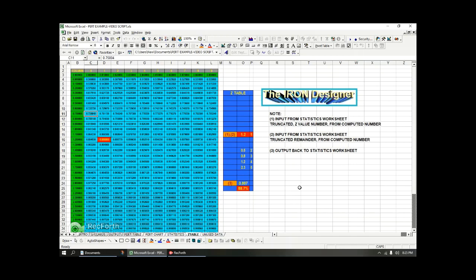What that means is that to the left of this normal distribution, you would have slightly greater than 75% of the normal distribution to the left. So you're encompassing about 75% of the probabilities and the data to the left of the chart on the normal distribution. So in this case, if you want to get very exact, you'd be at 75.8, okay?